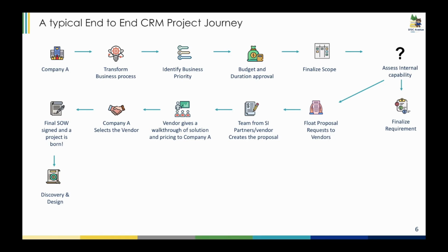they might come up with the user stories or the final set of requirements that need to be implemented. Once that is done, the solution design is also created in the same phase, or it might be created at the start of the implementation phase. Then we will have agile implementation, where there will be a set of sprints, maybe 4 sprints, 5 sprints. That is a time-boxed event, and in each sprint there will be development and quality assurance.